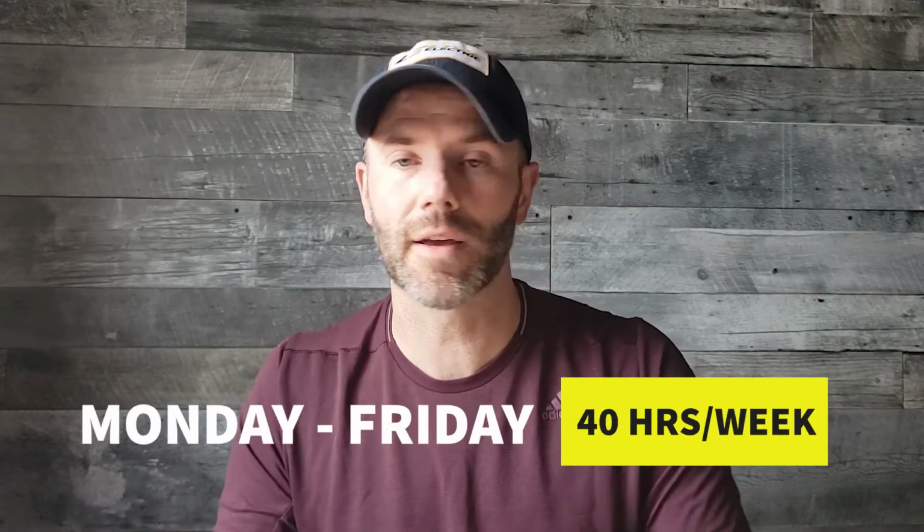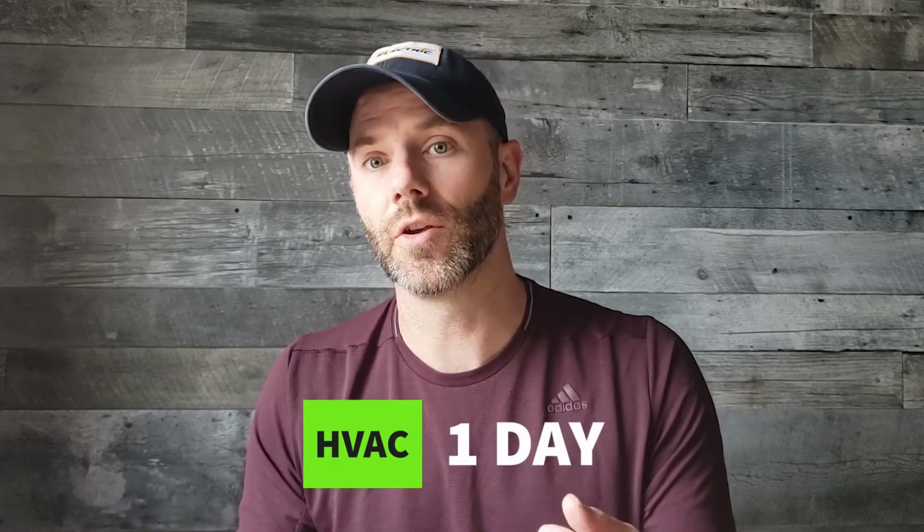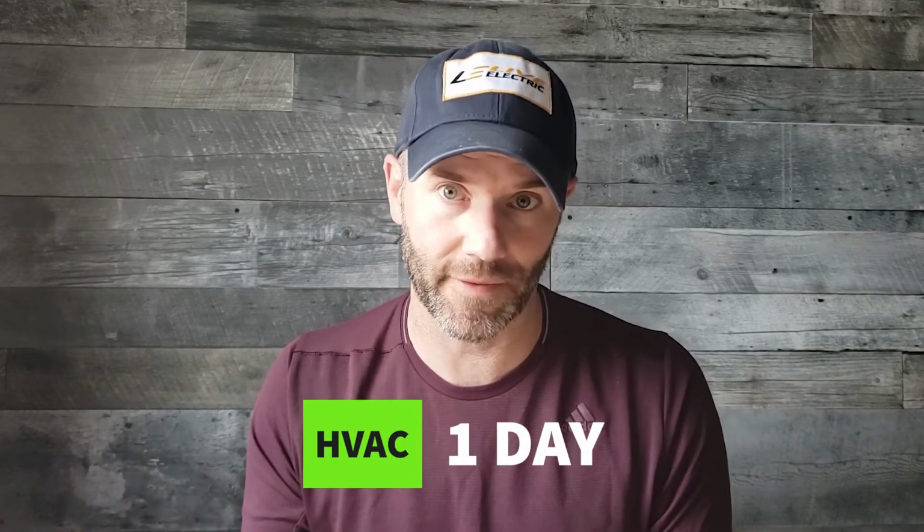We're only going to put one trade in at a time. It's only a 500 square foot basement. We're not going to ram people in to power it through. We're expecting a Monday to Friday work week, 40 hours a week, not working nights, not working weekends, just a basic regular work week in this timeline. Next is going to be your HVAC, your heat runs, your return airs, venting the bathroom fan if you have it. That's going to take a day.